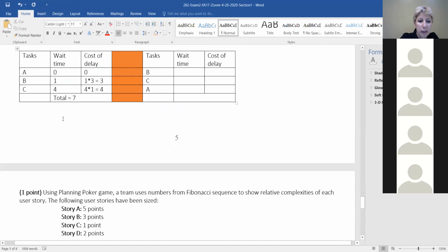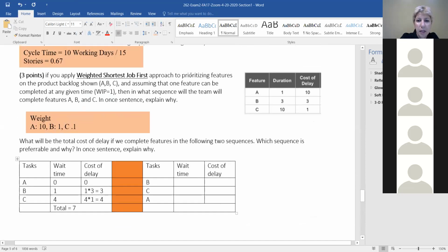And yes, we see everything on the same page now. Jake, you're gonna compare this, which is Ryan's suggested sequence of doing activities based on the priorities that he discovered using cost of delay and duration. So what if we do B first? Wait time for B would be 0 because B is now the first one.